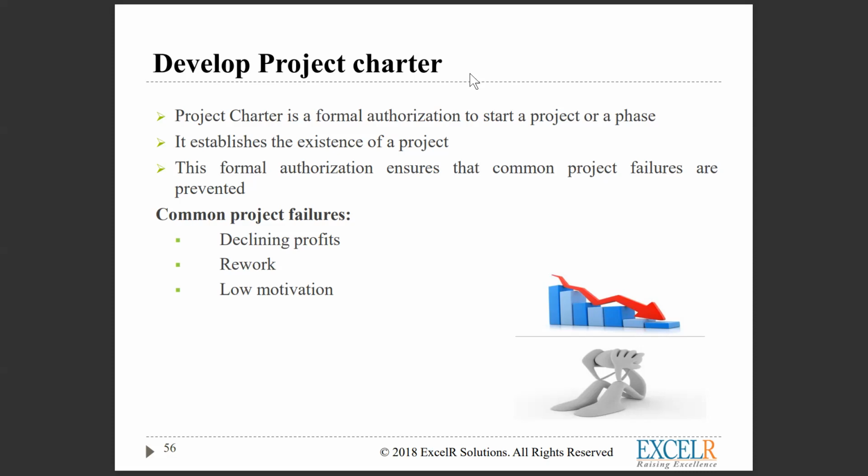One more question: can the project charter be modified any time? Yes, it can be modified any time, but again it has implications. You need to update it; you can append to the project charter. It's not a Bible saying, boss, I have defined this, this is what it's going to deliver. No, it cannot be like that. It can be modified throughout the life cycle of the project. Any document can be modified, but at the same time you need to have the buy-in from the stakeholder and from your management, then record it, append the version, and say this is my revised version.